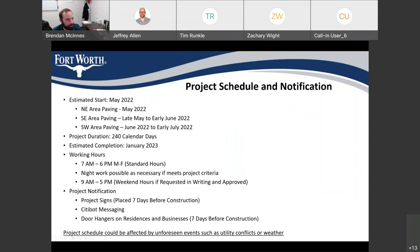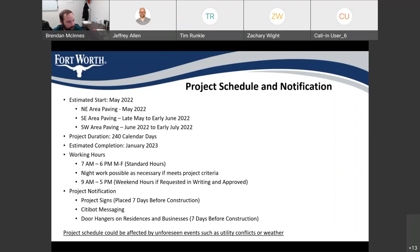Project schedule and notifications: we are estimated to start construction in May of 2022 with the northeast pavement area, looking at starting first in May 2022. That should take about three weeks to finish the resurfacing of the roadways in that area. As soon as that area is done, they'll be moving to the southeast paving area — Jones and 12th Street in the southeast corner — looking at working in that area late May into early June. Once completed there, they'll move to the southwest area, which includes 7th Street from Forest Park all the way into Burnett Plaza, and they'll be in there roughly early June to early July resurfacing the roadways.